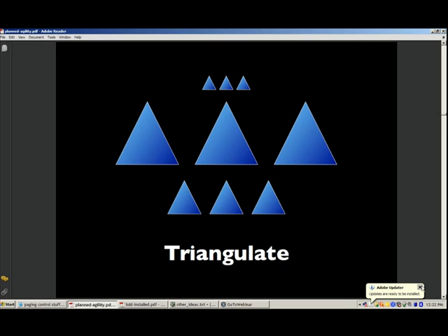And pin them up there so that when we were doing an estimation session, we could look at those stories and say, well, this story that we're trying to estimate really kind of goes with this particular 2. You know, these 3 2s that we really believe were 2s. And that can become a nice tool when you're doing your estimation for breaking ties. Sometimes we get bogged down, and estimation sessions can be pretty long. Talk a little bit about that in a second. But it's a nice way of dealing with the uncertainty of what is a point.